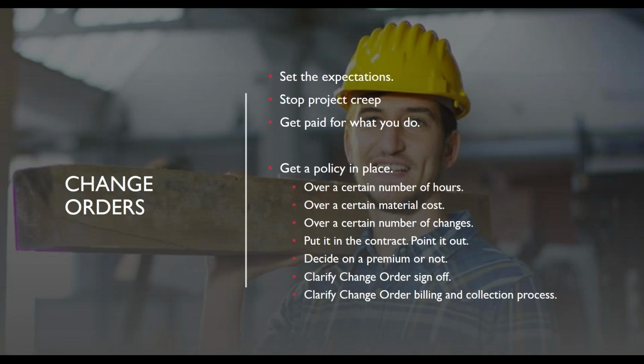Change orders seem to be the bane of many contractors. And there seems to be a lot of reluctance to hit owners up for changes that are requested on the fly, for fear of nickel and diming them or just simply wanting to keep a good customer happy. Unfortunately, without a good change order process in place, expectations are that you'll do the work and project creep sets in and you end up working for free.